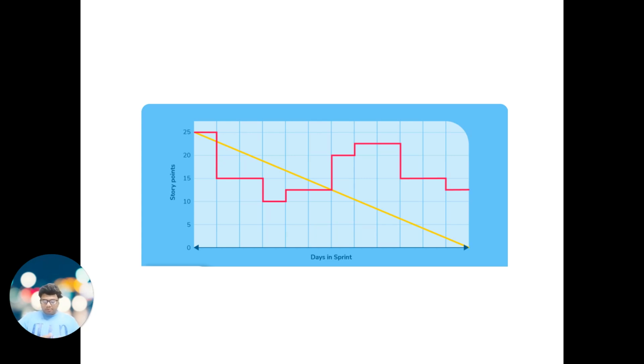It is called scope creep. Scope should be fixed and the developers should commit to the scope. After that, you should try to avoid putting user stories into the sprint backlog. So by just looking at the burndown, I will say, hey, the sprint planning was not done properly, or if it was done properly, after a few days the product owner came and said, hey, these are the highest priority, please start working on this. And so this is the case.